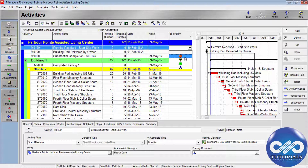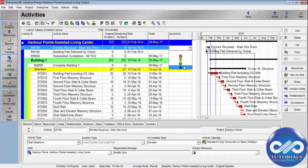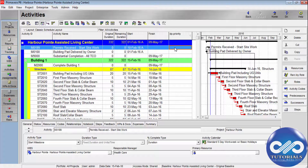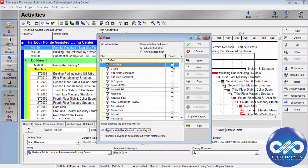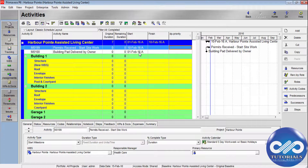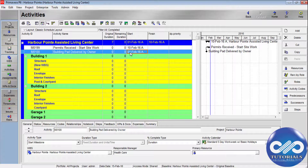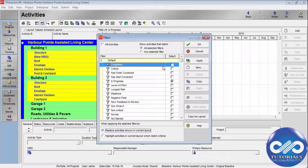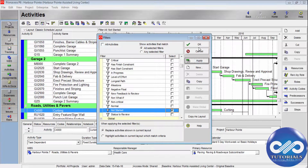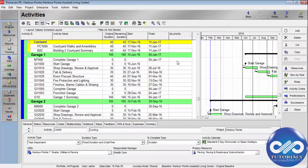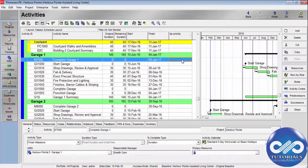The dropdown has four colors: red, yellow, green, and blue. For example: red for high-priority activities not started, yellow for high-priority activities that have started, green for high-priority completed activities, and blue for low-priority activities that have started. You define your own legend and indicate the criticality of each activity. For instance, filtering completed activities and marking a high-priority one as green, and a not-started one as yellow.